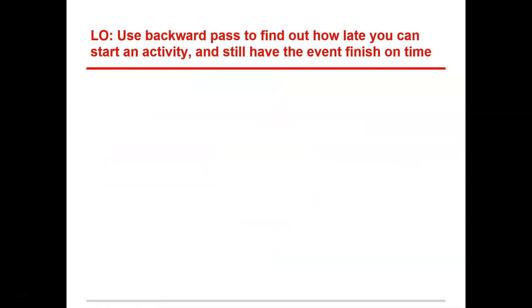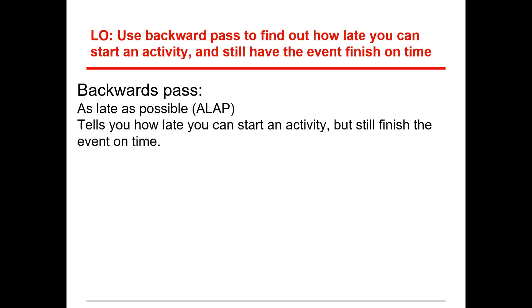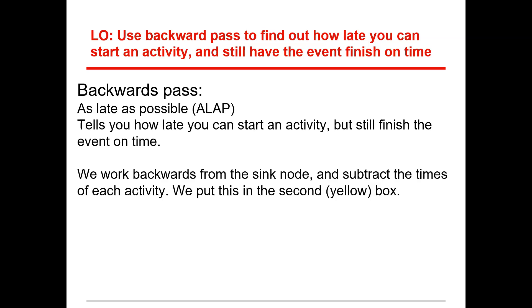So now let's have a look at backwards pass to find out how late you can start an activity and still have the event finish on time. So backwards pass is as late as possible. So when the activity is completed or the duration of the activity has to be finished by this time, no later time, otherwise it'll just start to affect the critical path. So it tells us how late you can start an activity but still finish at the event time.